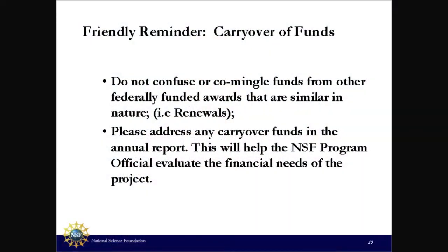So, all right, these are all the things that Dave, I know, has already talked about. We talked about carryover funds and things of that nature. Do not commingle funds. Please do not commingle any federal funds with another award, another grant, and say, okay, well, this is somewhat related, so let's just put a few thousand. Don't do it. Don't do it. Illegal. And make sure if you have carryover, address it in your progress report. Make sure you say that.